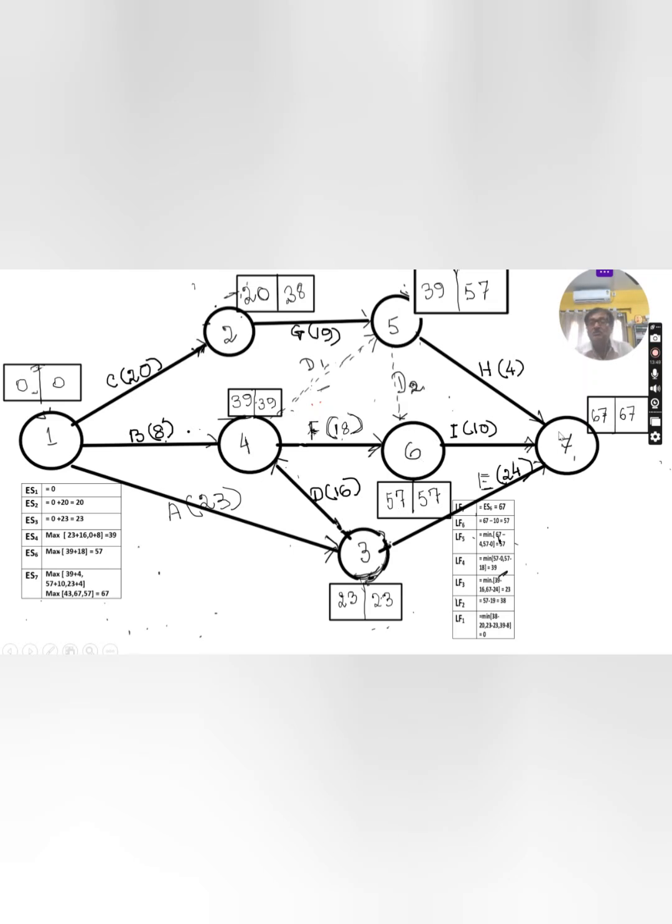Now the last node, 7, S7. Which activities are connected with this? 5, 7, 6, 7 and 3, 7. You have to compute the time, check which is the highest, and we accept it. For 5, 7, the earliest start time is 39 plus 4, that means 43.